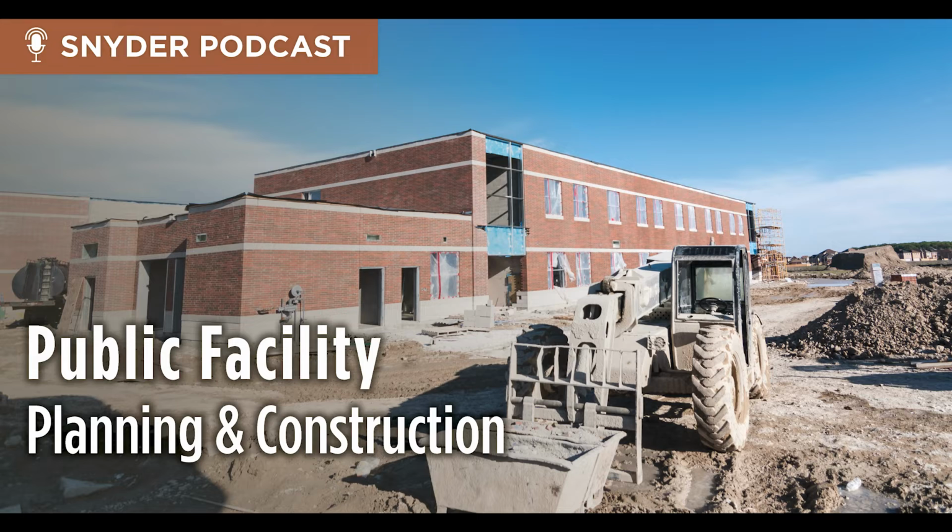From a schematic design phase all the way through a bid phase, we typically recommend 6 to 8 months to complete that work as preliminary work. And as you guys have noticed, there's a couple of critical pre-construction items like the soils that can go a long ways towards eliminating delays during construction that we can spend in that design period. The big difference I see here between obviously public projects and private projects is that bidding phase. Because we do have a lot of private development projects with architects where we go through that schematic design, development, construction documents. But when we're working with the public entities, that bidding phase, that timeline of meeting all the law and code requirements are really the big difference there.